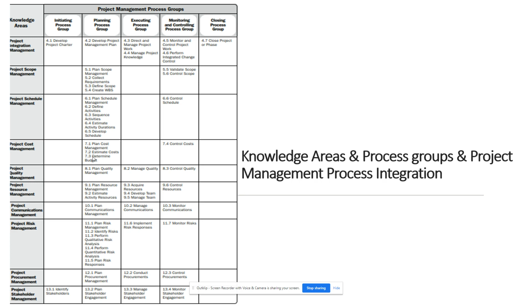So what are the tools and techniques? How can I develop the schedule, through MSP or P6? The method is called critical path method. Maybe network analysis is also applicable. During that time, I will do some resource analysis. Then maybe schedule compression, resource optimization. I have to look at leads and lags. These are the tools and techniques you will use for developing the schedule. The output will obviously be the project schedule, the baseline schedule, and the project calendar. So these are the inputs, tools and techniques, and outputs.